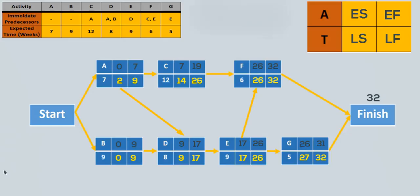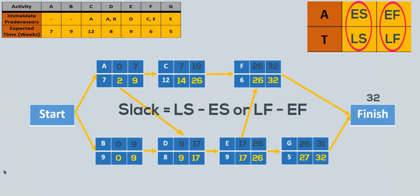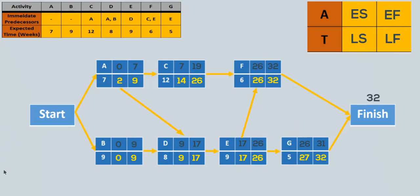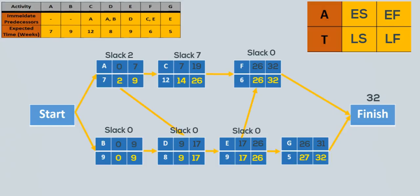The slack for an activity is defined as how long the activity can be delayed without extending the project's completion time, and it is calculated as LS minus ES, or LF minus EF. So the slack for A will be 2 minus 0, or 9 minus 7, which is 2. The slack for B will be 0, for C it will be 7, for D is 0, for E is also 0, for F is also 0, and for G is 1. For example, activity C can begin anytime between week 7 and 14, and it can finish anytime between 19 and 26. Thus C can be delayed for up to 7 weeks and the project will still be completed in week 32.